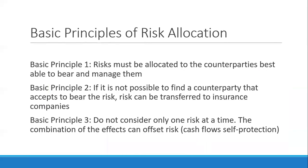The first basic principle of risk allocation is that risks must be allocated to the counterparties best able to bear and manage them. The SPV might not be the best party to manage a risk, and because it lacks the knowledge or expertise, the impact of that risk may be magnified. The best approach is to allocate those risks through agreements to a counterparty and let them handle the risk.